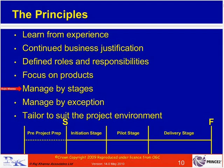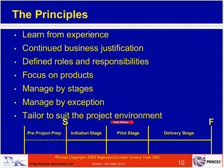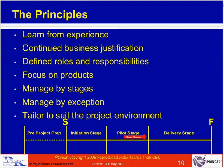Projects can be very large, so every project must be broken down into at least two management stages: the initiation stage and the rest of the project. Depending on the level of risk, the rest of the project can be broken into further management stages. At the end of each stage, we have an opportunity to review how the journey is going — whether our business justification is still valid. If it is, we move on to the next stage. If not, we either change direction or prematurely close the project.